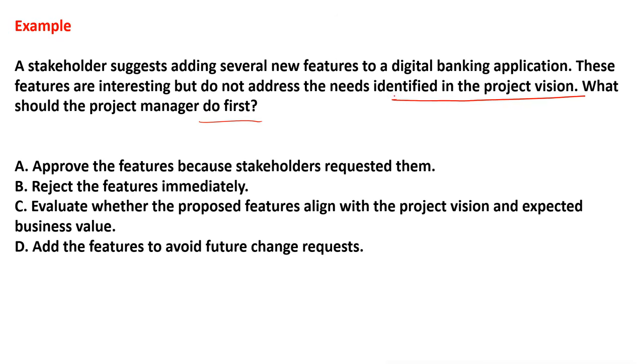As I told you, someone asking to add some feature: approve the feature because the stakeholders request it? No, you do not have to approve immediately. Reject? No, do not reject. Evaluate whether the proposed feature aligns with the project vision and expected business value, meaning it will add value to the business or not. If it adds value, then we have to change the vision statement. So this C option is the best option.